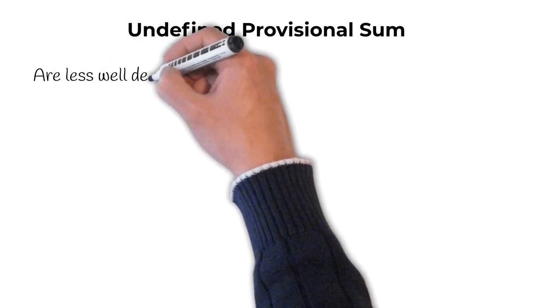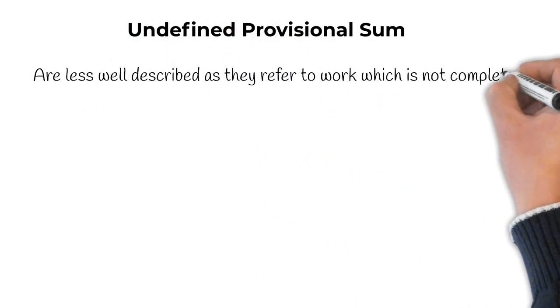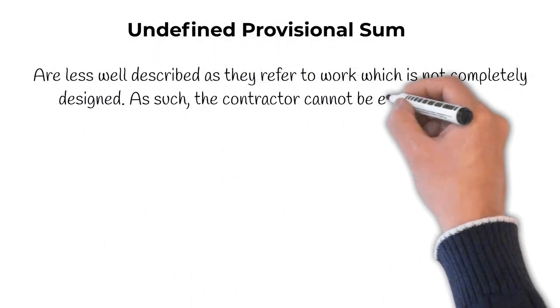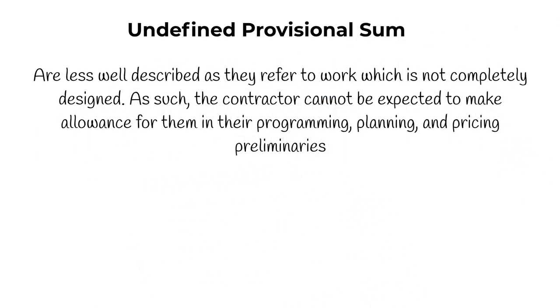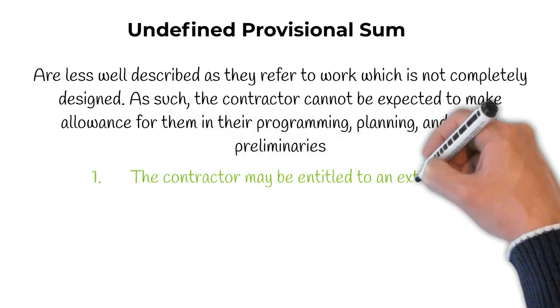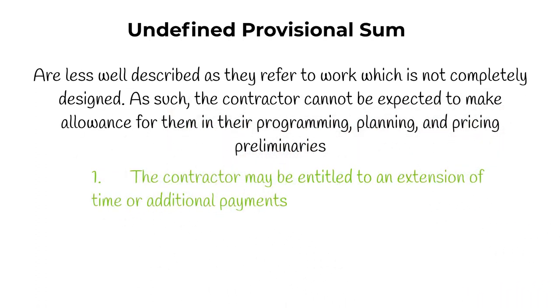Undefined provisional sums are less well described as they refer to the work which is not completely designed. As such, the contractor cannot be expected to make an allowance for them in their programming, planning and pricing of prelims. This means the contractor may be entitled to an extension of time or additional payments when the actual works are undertaken.